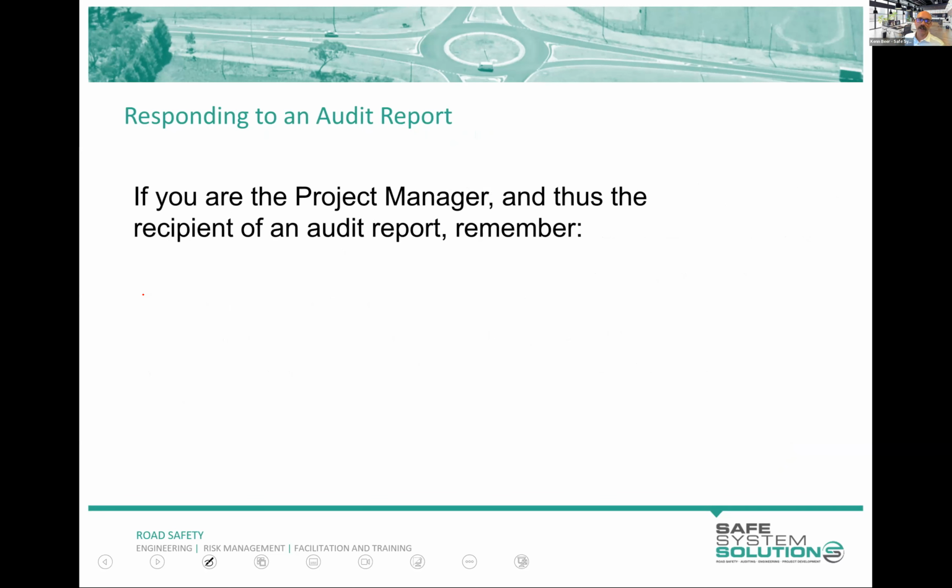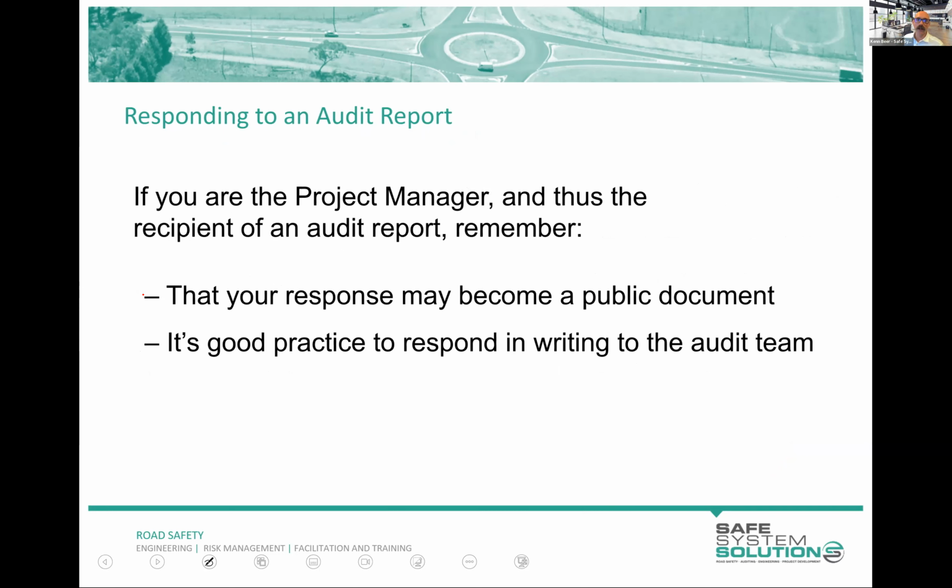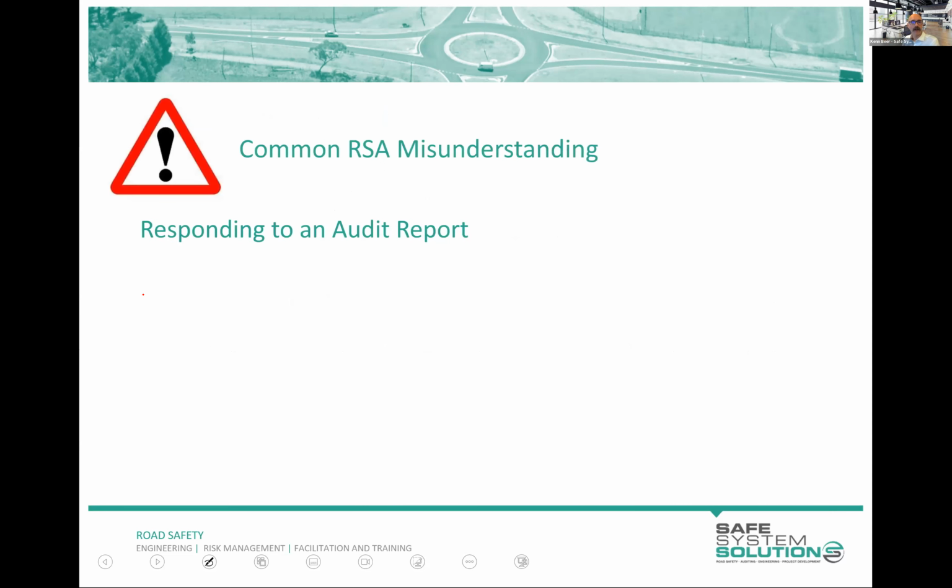If you're the project manager and you're receiving this report, a few things to remember. The responses that you write could become public, even though it is internal that you're jotting this down. Freedom of information means that those things can come out. It's good practice to respond to the audit team in writing. We like that as audit teams, to get the final: yep, we're going to do this, we disagreed with this, or we're going to do this other thing instead. But that's not absolutely required.